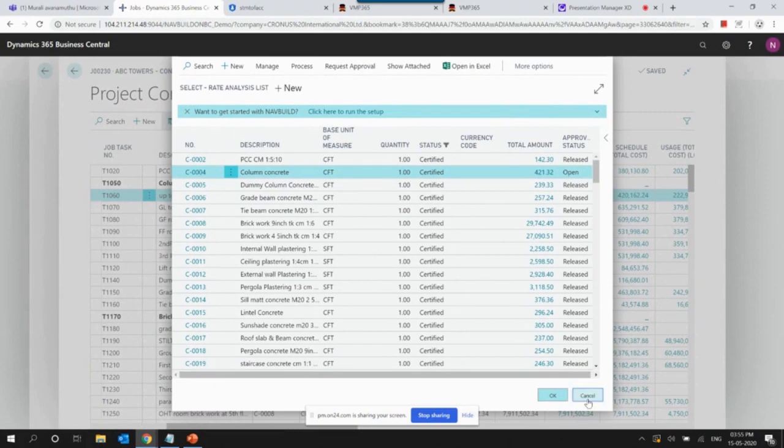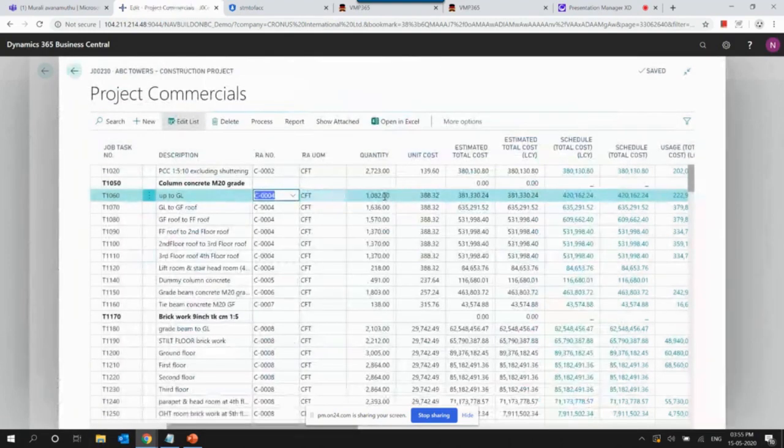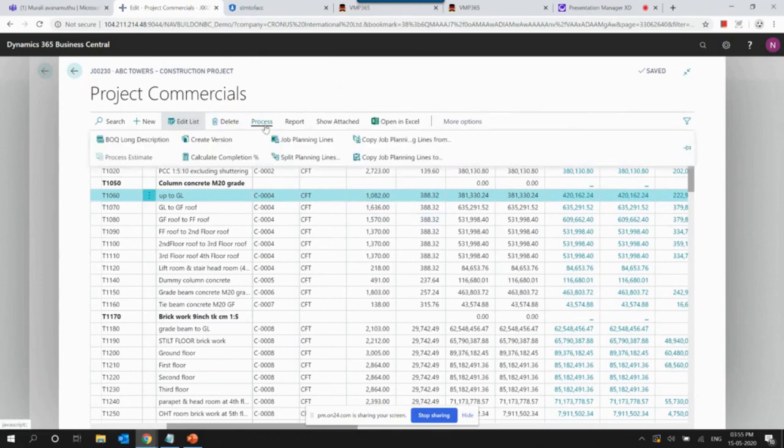Okay, but my BOQ demands something more than that. The BOQ will vary from project to project, right? In such cases, the BOQ system does the multiplication with the BOQ quantity, and hence the overall project costing is arrived at. And here, what Murali was referring to in his presentation, there are provisions for managing multiple versions. So version control is enabled for the BOQ.